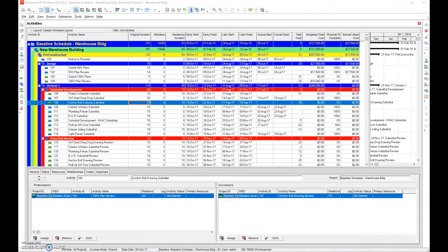Step 22 is schedule update reports. Now that we have the schedule update done in step 21, we're going to have to do some reports. There are two different types of reports we're really going to do. If the project is on schedule — which this one is not, as we can tell by the negative float numbers — we can do one or two schedules. If we believe based on our analysis that a schedule review got us behind, or something else that is the customer's or client's responsibility, then we're not going to do a recovery schedule, simply because we're not responsible for the delay.